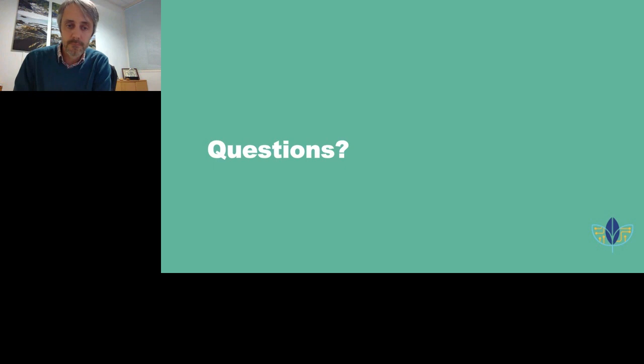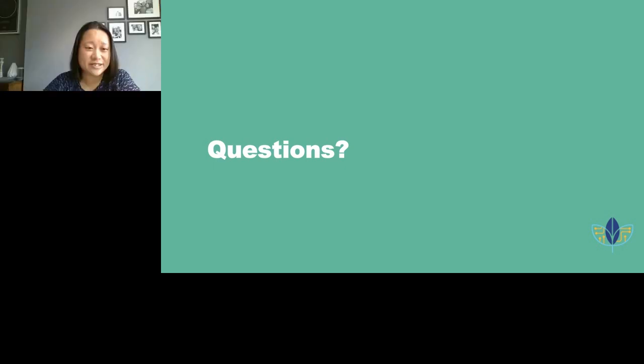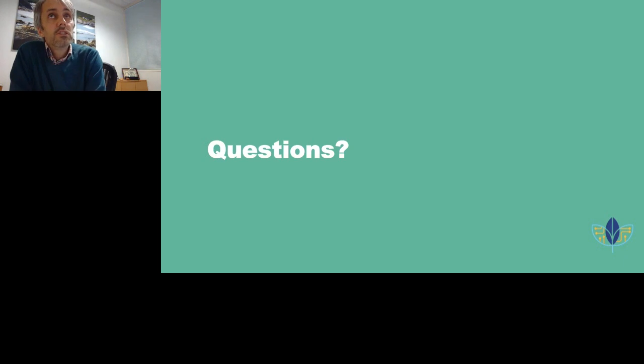Okay, great. Another question from the audience is, how much time does living documentation save on average? Okay, that's interesting. Living documentation, roughly speaking, we find takes documentation down from what was weeks of activity for the engineering team down to days in the release cycle. And on testing and test automation, we've seen it taken down from months on regression testing down to weeks.